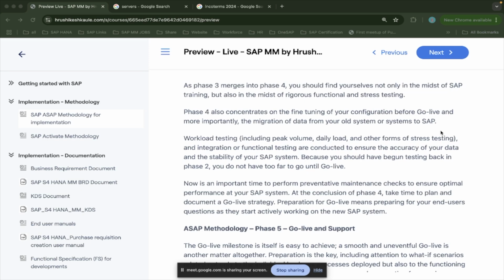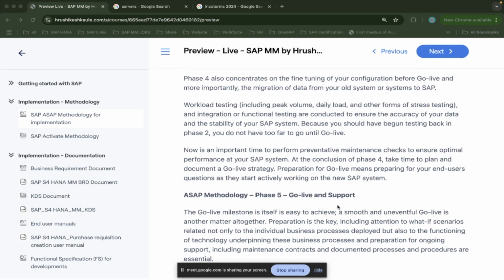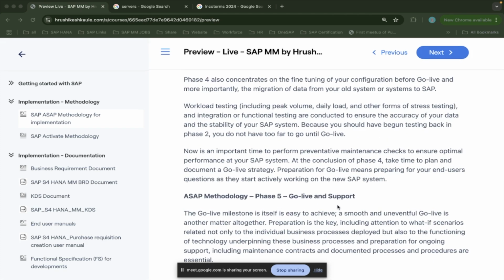But while sending, we need the invoice. So that invoice will be generated in SAP. So when SAP goes live, the invoices are generated and sent with the truck. So that is the go live. And after that, as per the contract, there is 1 month, 2 month, 3 month support. That support, like after go live support from the IT team or the consultants, is done. That's it.